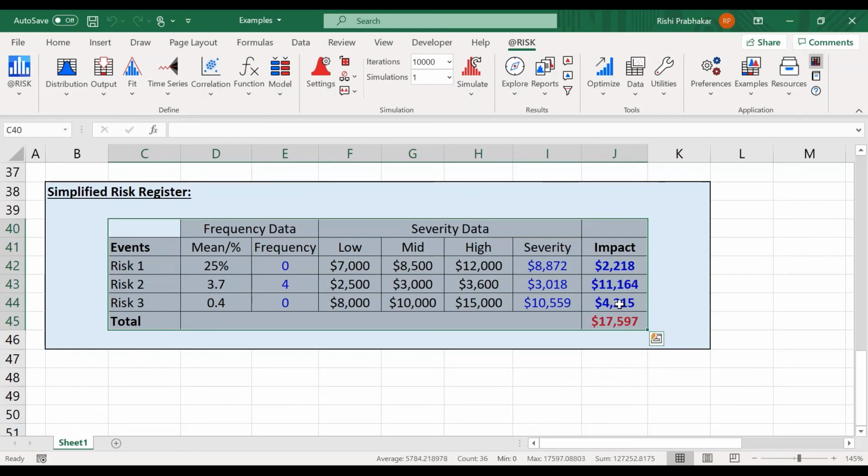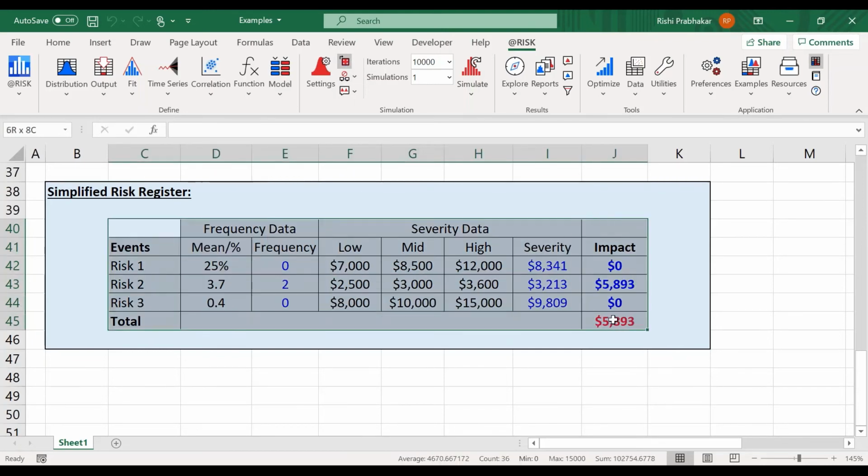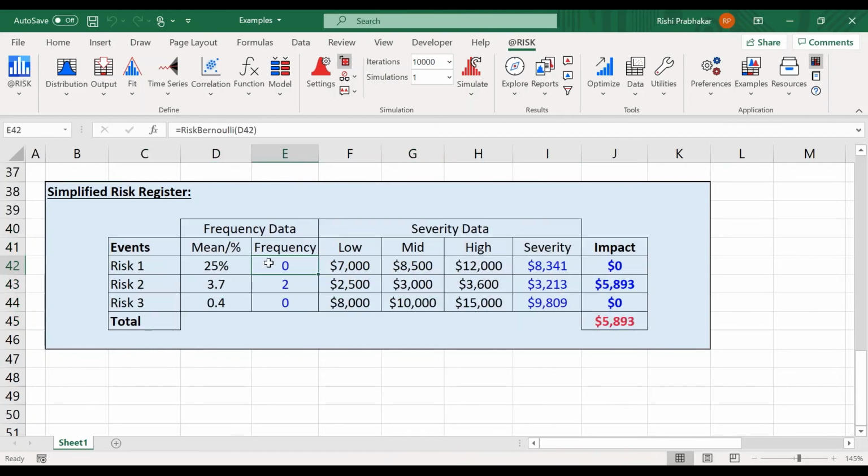Okay, when you're not throwing the dice at a craps table, the dice in someone's hand has numbers on top. That's the equivalent of these things. They're just some numbers that happen to be on top because Excel always returns a value. The trick will be, during a simulation, and I've just turned the random mode on now, so now you're actually looking at a live model. Whenever the frequency is 0, the impact will have to be 0.